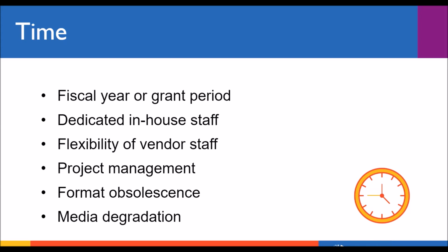You may also not have staff time available to prepare material to send to a vendor or manage a vendor project. If you can only dedicate time to a digitization project sporadically, it's likely not feasible to use a vendor, which would require dedicating resources on given timelines in order to meet any sort of contract requirements.